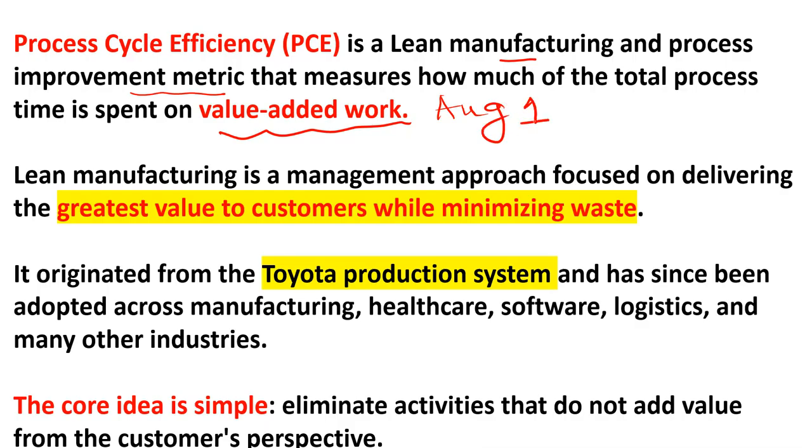The request came on August the 1st, and you said, okay, we can make the website for you, but you have to collect it on August the 31st. So this is the requested date, and this is the delivery date. The difference between these two is 30 days. This is known as the total lead time. The request came and the delivery date, right?